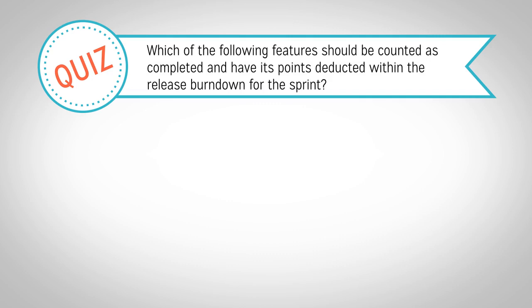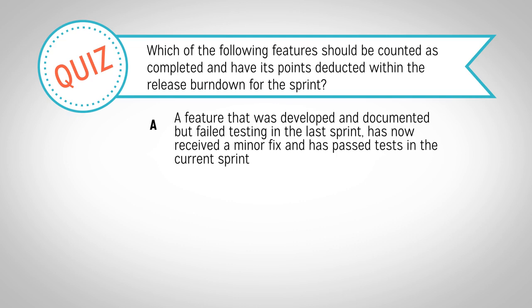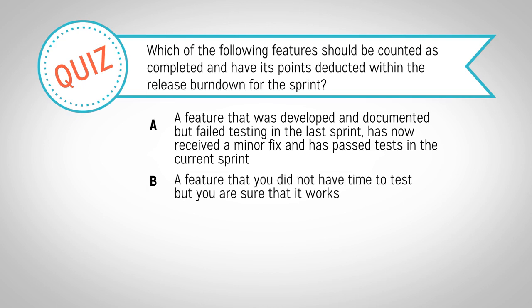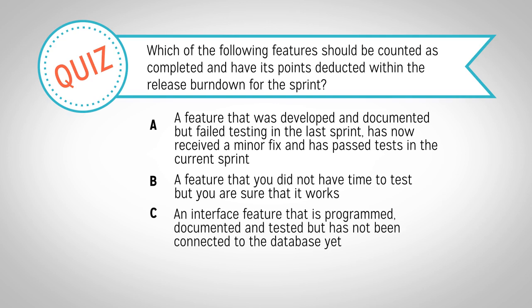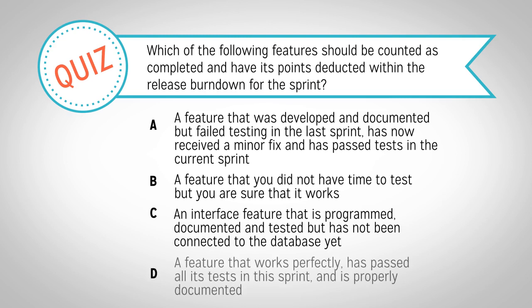You are working on a team developing a mobile application. You have just completed your third sprint. Your team's definition of done includes only features that are programmed, documented, tested, and ready for market. Which of the following features should be counted as completed and have its points deducted in the release burndown? A: A feature that failed testing last sprint, received a minor fix, and has now passed tests this sprint. B: A feature you did not have time to test but are sure works. C: An interface feature that is programmed, documented, and tested but not yet connected to the database. D: A feature that works perfectly, has passed all tests this sprint, and is properly documented.